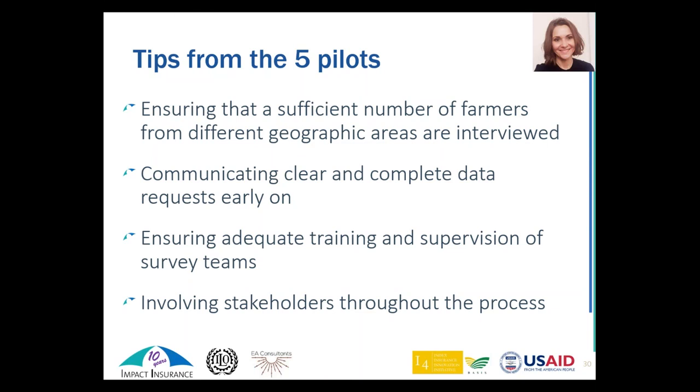In the data collection, of course, a big part of it is the farmer surveys, but also obtaining administrative data from different stakeholders. And this information might not always be readily available. Partners may have to produce it specifically for the analysis. So being very clear and communicating the needs early on to the partner, even in terms of granularity or formatting, will help minimize delays and make sure that the data is usable and accurate.